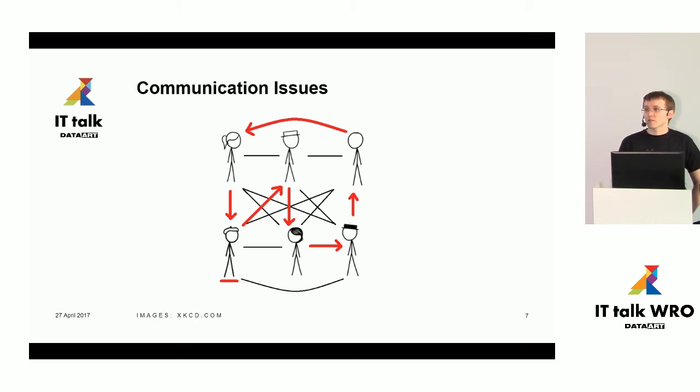are not completed in time, deadlines are not met, including personal tasks, including team commitments. All evaluations say that with that number of people, it should be enough for your project to accomplish everything in time, but it's not the case. You're trying to update the process, run some additional meetings, the situation gets even worse. You're trying to add some additional people, maybe cover some tasks, the situation again gets worse. You're trying to push harder to make people work harder, it doesn't help. It may mean that people are too distracted with unnecessary conversation, and the whole communication process on your project is not in a good shape.